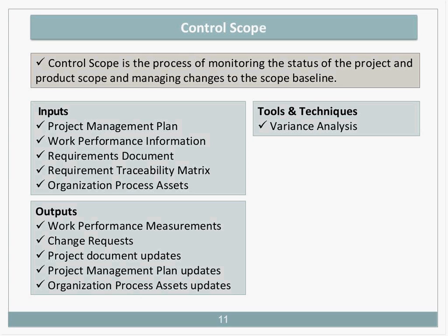Information such as progress made with completed deliverables, so that it matches the defined scope, is used to control the scope of these deliverables. The required documentation contains functional and non-functional requirements for the project. The requirements traceability matrix provides structure to control changes to the deliverable scope, as it links every deliverable back to the business requirements. Organizational assets, such as policies, procedures, or standards that are control related, need to be taken into consideration.